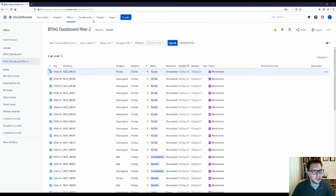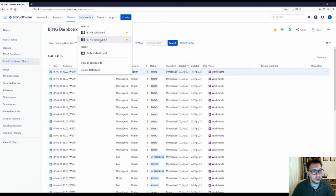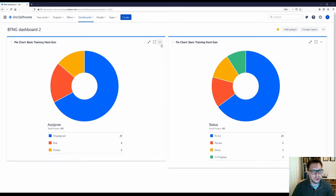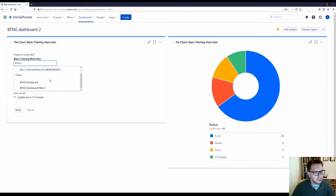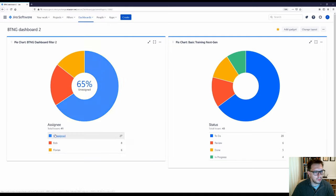Now that I've done that, I can return to my dashboard, which should be in your starred list at the top — but you can also find it via View All Dashboards. Now I can configure this particular pie chart to use my BTNG Dashboard Filter Two instead of the whole project. It'll still be by assignee. If I click Save, that should have gone from 43 to 41 — and those are the two epics that we've just removed.